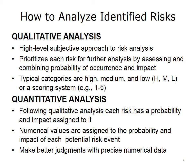Let's review more information about qualitative and quantitative risk analyses. The qualitative analysis uses a high-level, subjective approach. It triages the risks by assessing the probability of occurrence and the impact, which are often expressed with ordinal rankings like high, medium, or low. You can also assign a score of 1 to 5 or 1 to 10 to better pinpoint the relative probability or impact of the risk. Once you've organized the list by scoring or ranking, you know which high-priority risks to move forward into quantitative analysis.